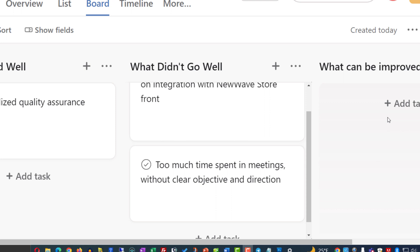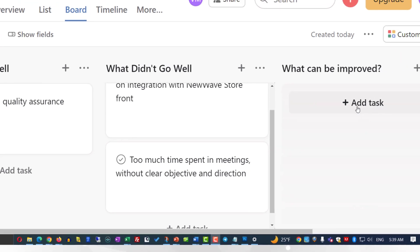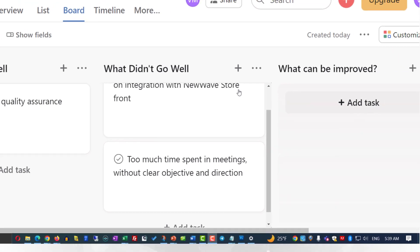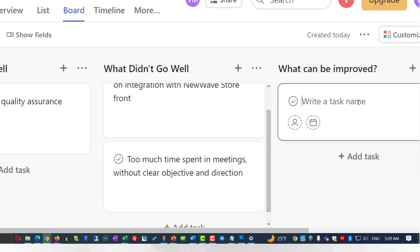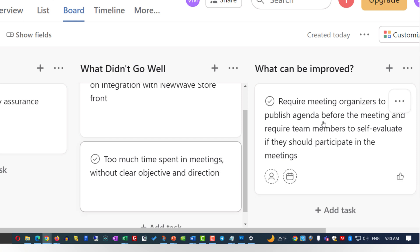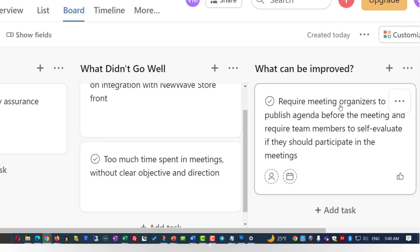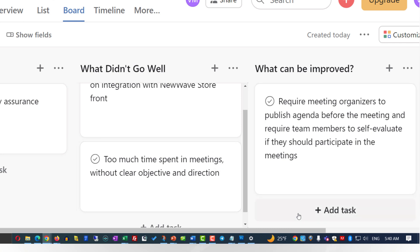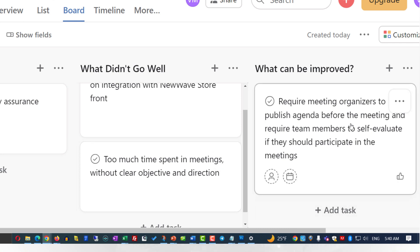Typically in the 'what can be improved' section, you see reactions to items from the 'what didn't go well' section. For example, our response might be: require meeting organizers to publish an agenda before the meeting, and require team members to self-evaluate if they should participate in meetings.